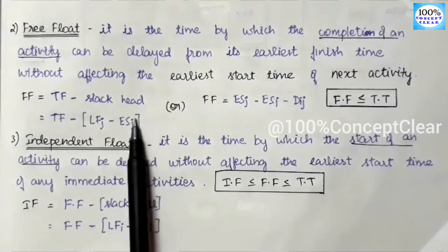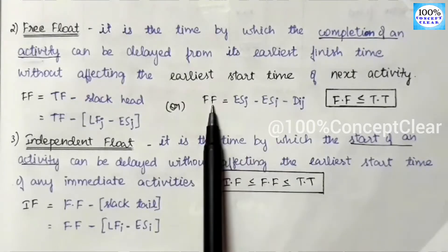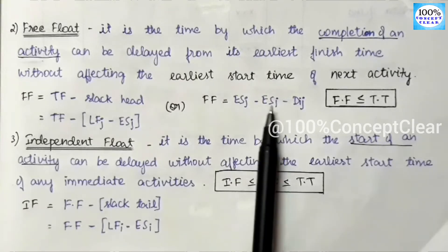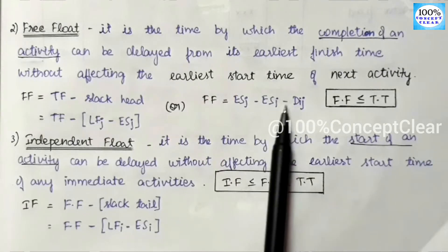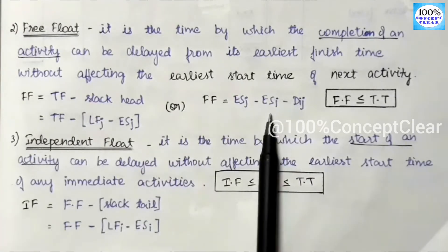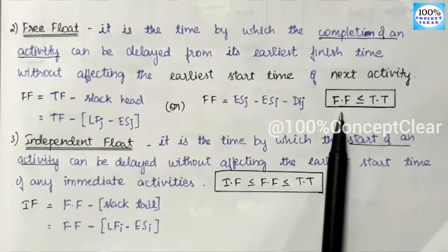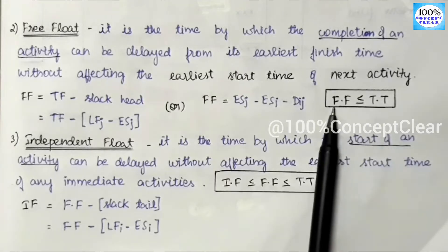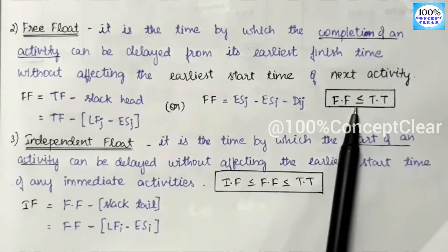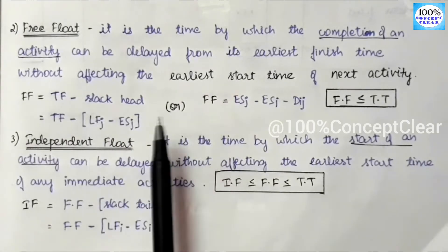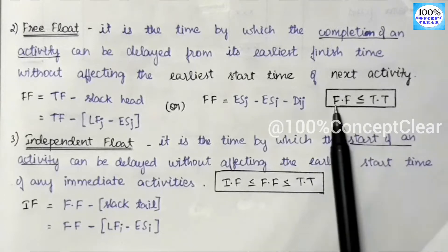An important note: the Free Float value is always less than or equal to the Total Float value. If the result is negative, we take it as zero, because we subtract the Total Float value using this formula.